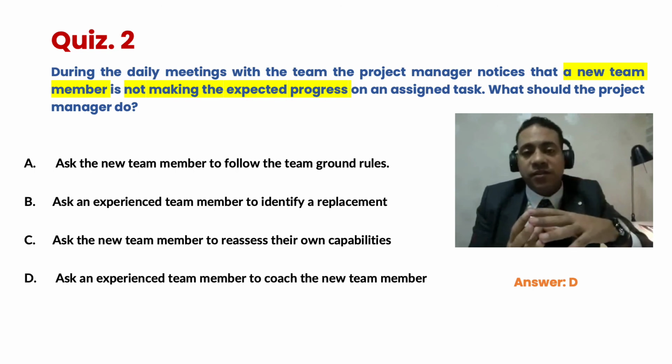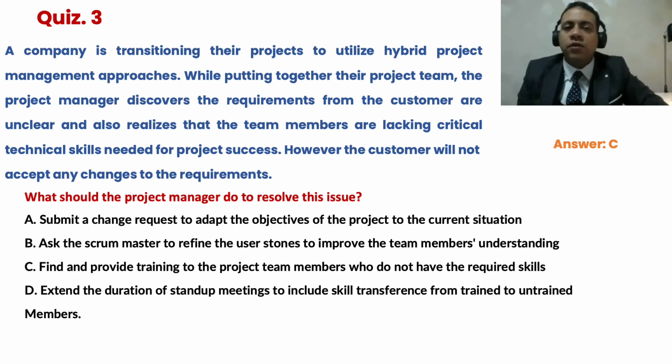Training team members and stakeholders has 4 enablers. 1, determine required competencies and elements of training, in other words, identifying training needs. 2, determining the training approach. For instance, are you going to use instructor-led training or virtual training to deliver the training program? 3rd, identify the training resources. So allocate resources for the training, such as people, cash, and equipment.